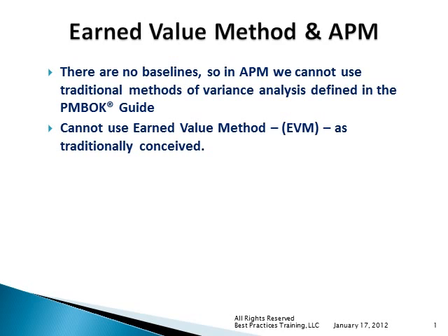And without that, we can't do earned value as it's traditionally conceived. We need a detailed cost baseline, really all 3 baselines, the performance measurement baseline. We need that all detailed out up front so we can do the type of specific earned value measurements. So let's look at another slide and see how this really truly works.